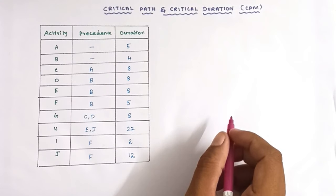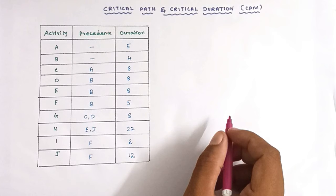Hello friends, today we're going to see how to calculate the critical path and critical duration. First we have to know what is meant by critical path and critical duration. In a network path of any project, the longest duration is called critical duration, and the corresponding path having the longest duration is called the critical path.